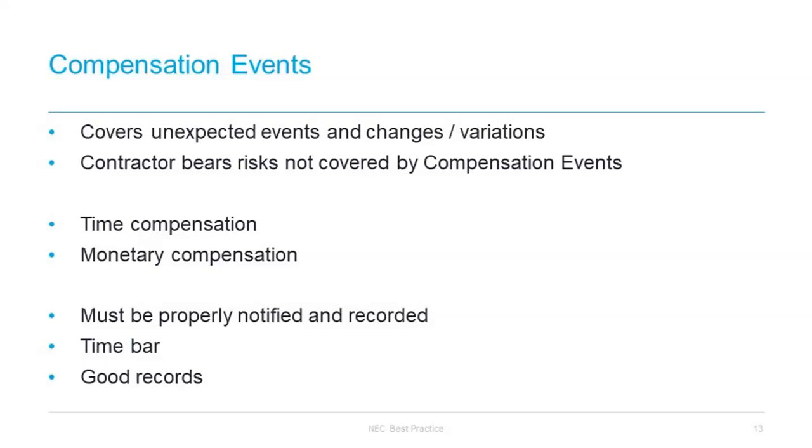The contractor's contract data part 2 allows for the definition of the working area to be added, so as to include, for example, off-site working or storage areas or off-site accommodation areas. If head office personnel or locations are added to this definition, as can sometimes happen, this can cause confusion as really it will duplicate parts of the fee percentage element which is applied on top of the compensation assessment.